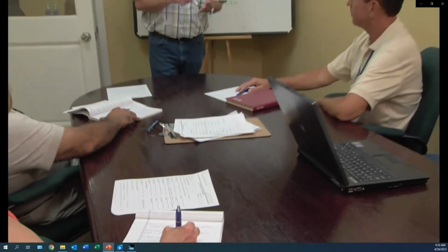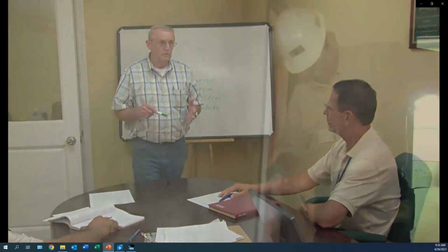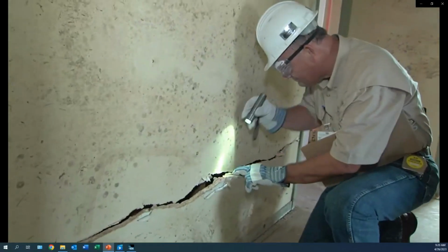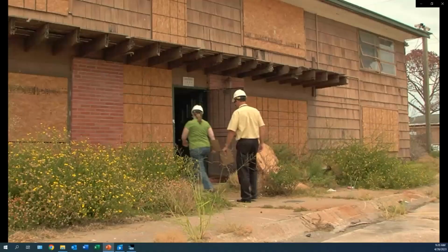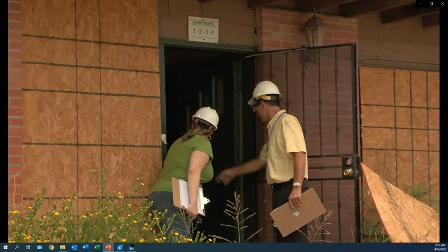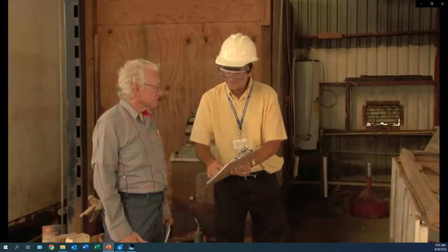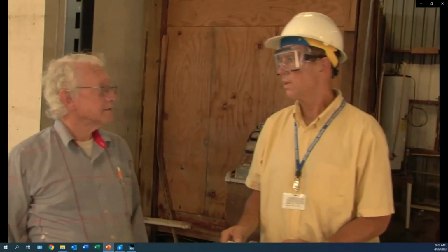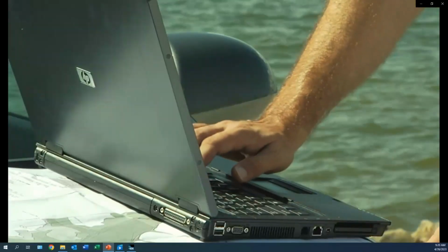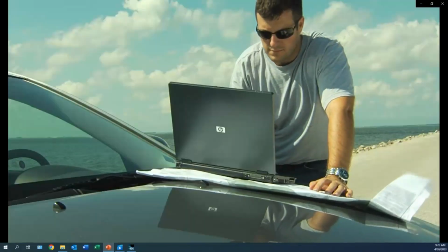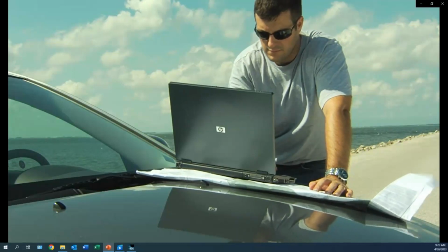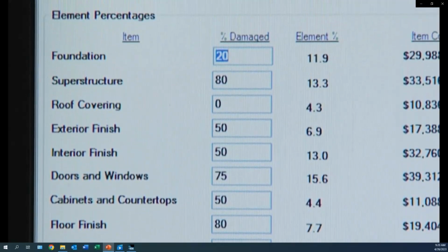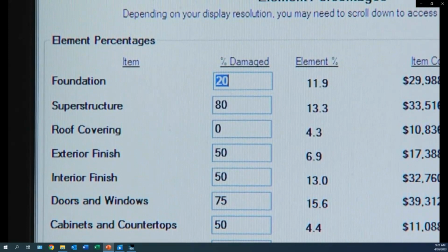Some key points to convey to team members during training include: 1. Safety is a priority, and inspectors should use protective equipment such as goggles, hard hats, gloves, and boots. 2. Acceptable procedures for gaining access to buildings. 3. Not to discuss the impact of the damage estimate on reconstruction or acquisition programs with property owners or renters. 4. Determine ahead of time who will be entering field-collected data into the SDE software and when this will occur. 5. The residential and non-residential building elements that each team will need to assess for damage.